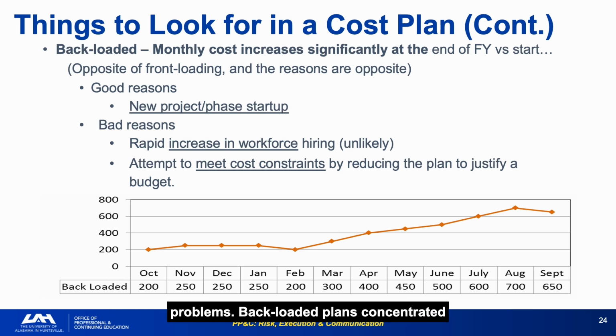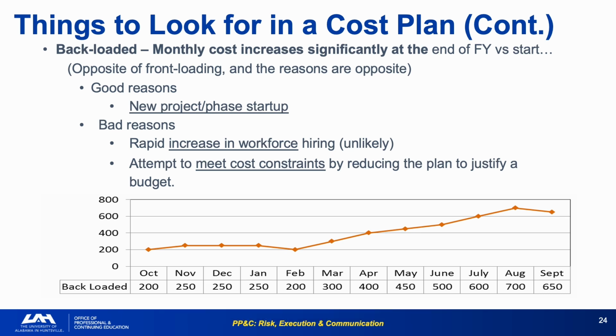Backloaded plans concentrated in the final months of the fiscal year attract oversight attention because they appear to hide reserves, even when there is a legitimate programmatic explanation. If a backloaded plan is legitimate, document the technical reason explicitly in the phasing notes. An unexplained backload will generate questions that could have been preemptively answered.